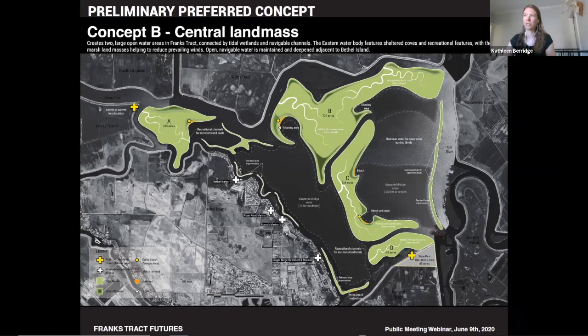There's a question from Matthew Anderson about, won't construction be limited by the Delta smelt, for example? There can't be pile driving during certain months of the year. And we kind of touched on that. There will be sensitive windows for special status species that will need to be addressed during the construction and permitting process.